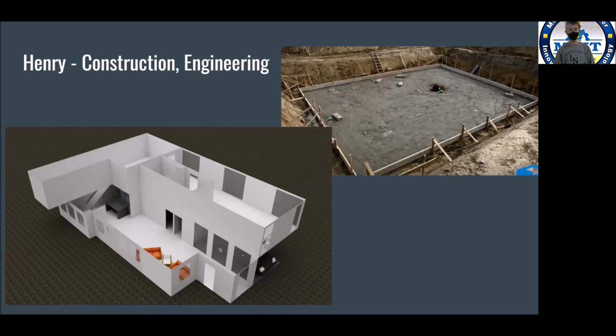When talking about laying a foundation, you need to be mindful of where other aspects of the build will go. For example, make sure you have spaced out a place where pipes will go. That actually goes into the topic of site logistics as well. Site logistics is planning, sequence, and order of your resources on a construction site. From things like making sure you have enough time to build the walls before the ceiling trusses come in, to making sure that the dumpster is in an accessible spot for the garbage truck.